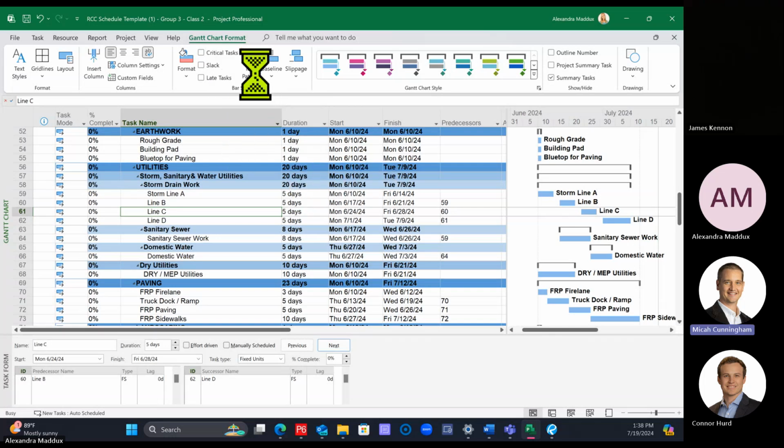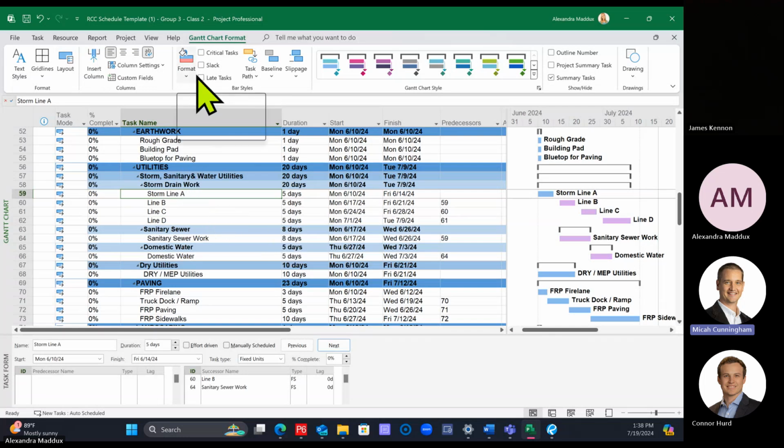Oh yeah, you could also do just any successor, which is not just driven by it, but any successor. That's an option as well. That's helpful if you have a delayed delivery and you want to see everything that comes after this delivery. Then you can click on it and see everything that turns purple is everything that follows the sequence of that delivery at some point or another.